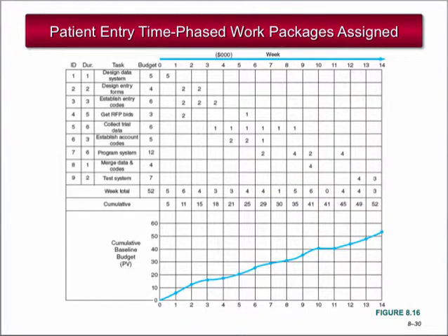Notice that costs do not have to be distributed linearly, but the costs should be placed as you expect them to occur. Now that a time-phased budget baseline has been established, the planned schedule and planned costs can be compared to the actual schedule and actual costs. Remember, if your budget costs are not time-phased, there is really no reliable way to measure performance.